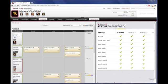So you've got to turn the premise around and say, we're not going to focus on the 50 pages of things the system needs to do. We're going to focus on the first and most important things, and when we get those done, we're going to take the next 10 most important things. And when we get those done, we're going to take the next 10, and we're just going to continue to iterate outward, but we're going to get the most critical items done first and make sure that they're done right.